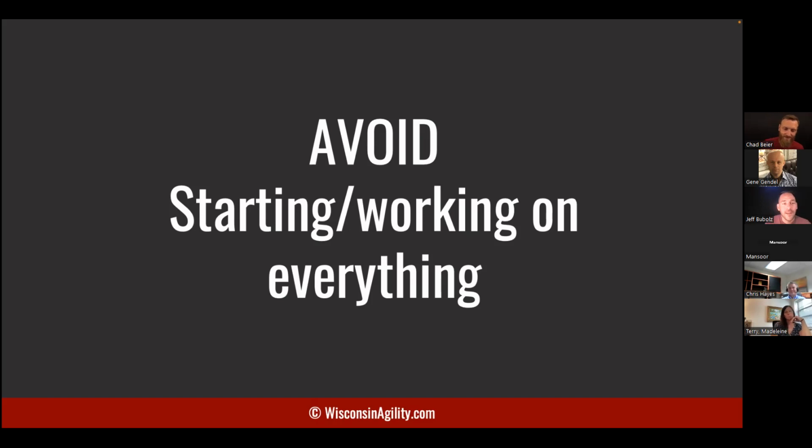False, right? If we have focused effort, we will be able to get things done quicker and in shorter periods of time. It's Little's law. It's been proven over and over again. And so we're just saying leverage that.